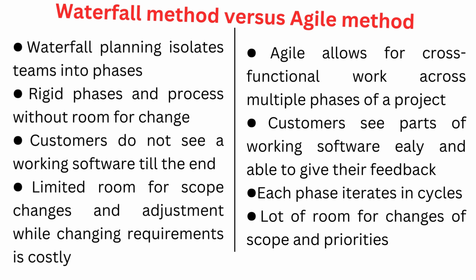requirements are met. When we talk about waterfall, it has rigid phases and one cannot deviate from them even if you find an issue in a previous stage. But agile allows flexibility, and since only a small part of the software goes through the phases in an iteration, if there are issues, they will be caught sooner rather than later, and corrective actions can be taken immediately.